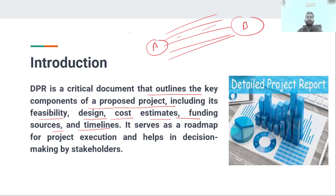This is a project. Now we need to check the feasibility of this project — whether it is feasible or not. We have to check the cost estimates. For example, we have to check whether the road needs to be converted to six-lane based on the traffic flow. We have to check the traffic flow and report it. We have to identify and solve the problems to determine the feasibility of the proposed project, which is explained in the Detailed Project Report.